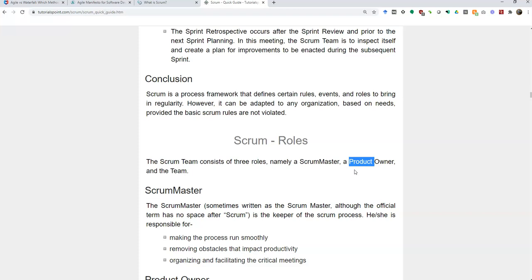But the original Scrum idea was 30 days that you work on an iteration of the product. And during that iteration, the priority doesn't change. Everybody knows what thing they're trying to implement. And at the end, you'll have a working product.